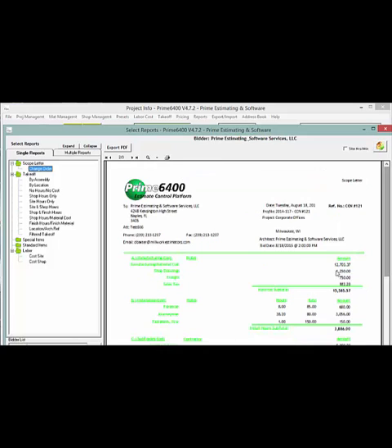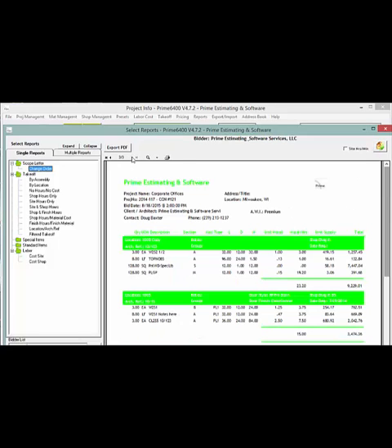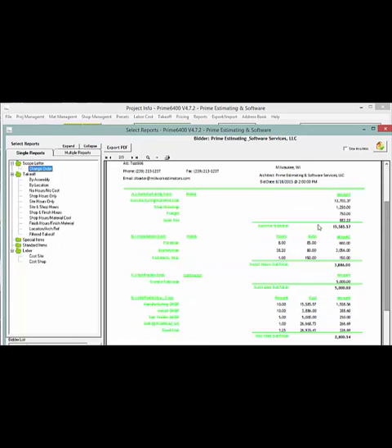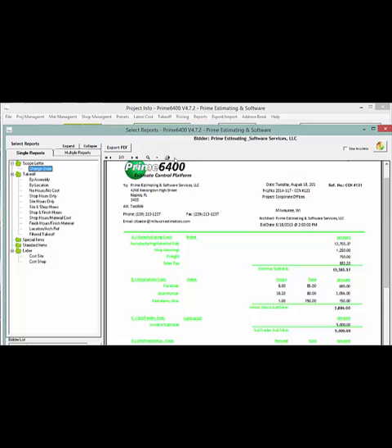Now to back up the material number up top here, when we go to the final screen and final page, what you're going to find is an actual copy of the takeoff that you've input with the items from that takeoff. There's room 1000 copy, and we copied in from the base bid of room 1005 with all the information that's put there. So it's that number that's being brought forward to the bid summary. Those number of install hours are brought back to the bid summary. And that's what we see right here. There's your manufactured cost, and there's your install hours. And then we, of course, include foreman and fasteners on top of that, okay, to come down to the final number. So then that is, of course, then printed.